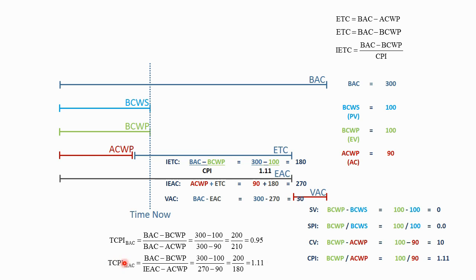And in the previous case, we had a TCPI of 1.0. Well, that would look kind of normal. We'd have a CPI of 1.11 for this period. But if the project manager went back on plan and stayed at a 1.0, they would finish at that underrun that I think was 10 hours. In this new case, though, we're expecting that this performance persists through the end of the project. That means that every reporting period, the CPI will keep remaining at 1.11. And in fact, because we revised this EAC downward to 270, the project has to perform at 1.11.